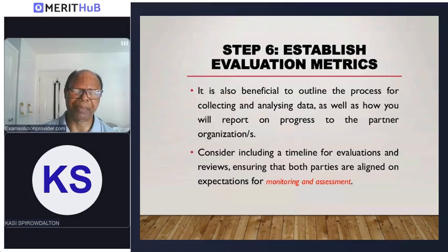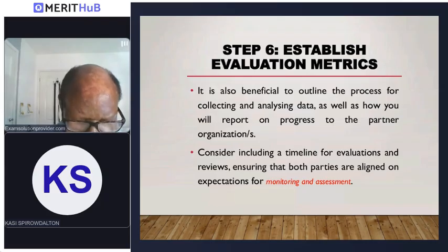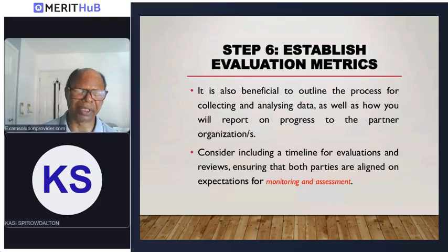So it's important to be doing monitoring. Evaluation, in most cases, particularly in Africa, we tend to think that evaluation should always be at the end of the project. So what serves in the middle is going to be the monitoring process. So you may monitor at the end of the week, try to sit down and see how everything is going on. If obviously it's not going according to plan, then it means you need to readjust, try to identify what the problem is. Why is it not going according to the plan?